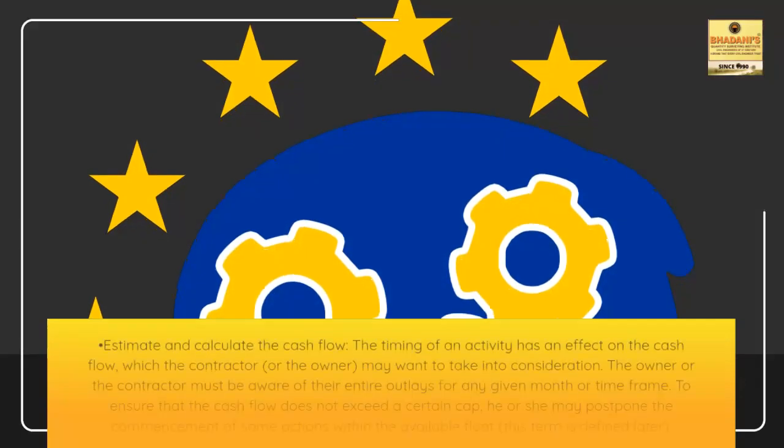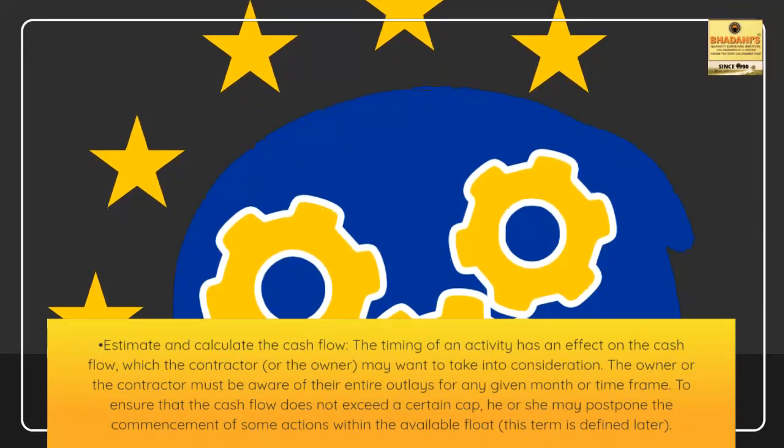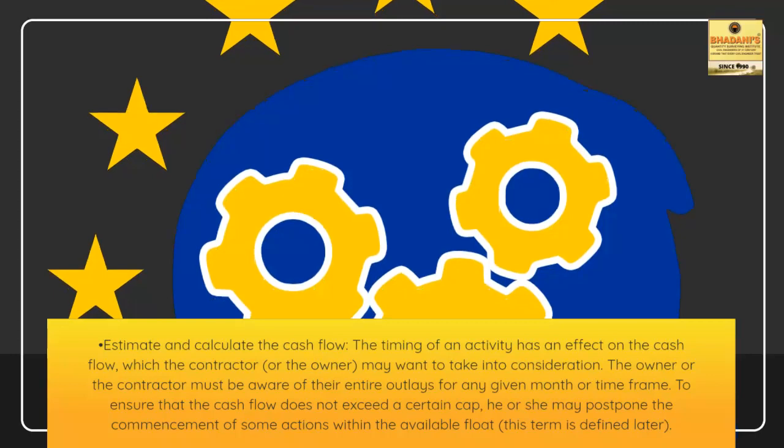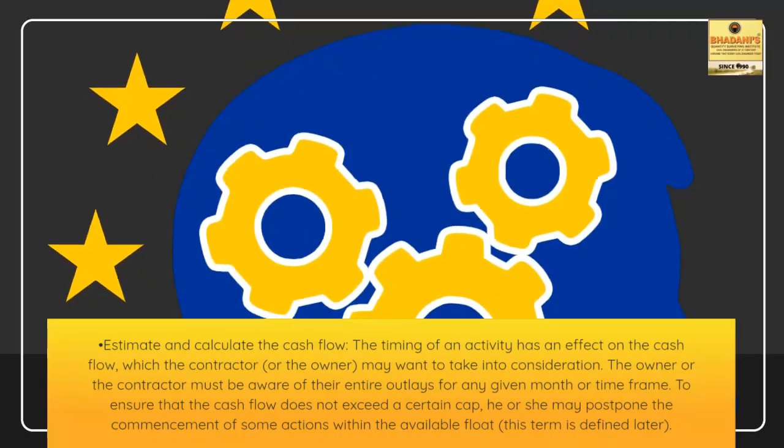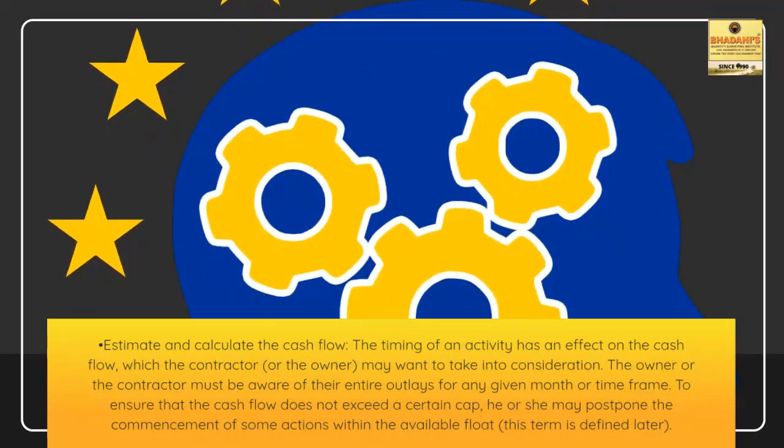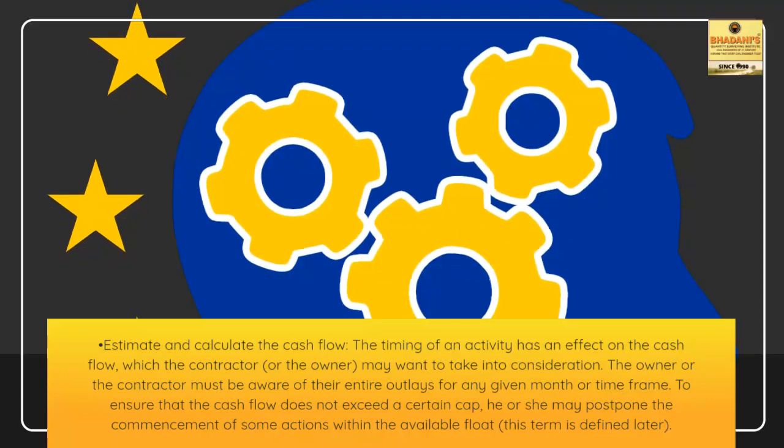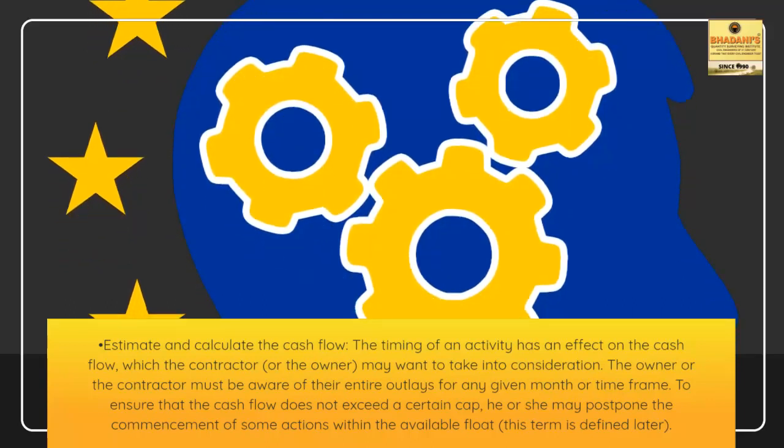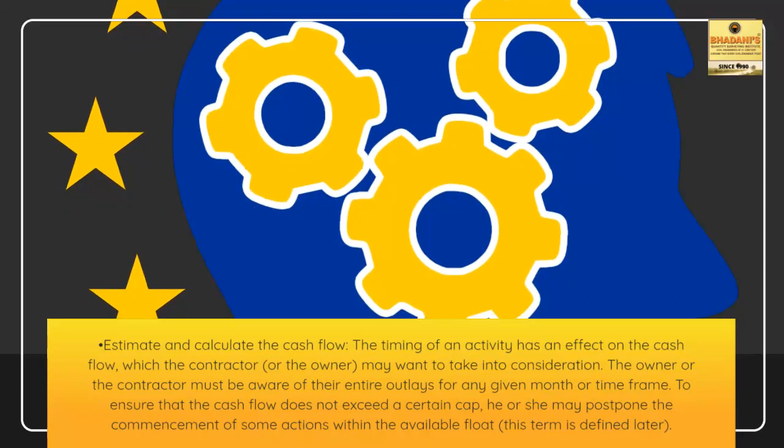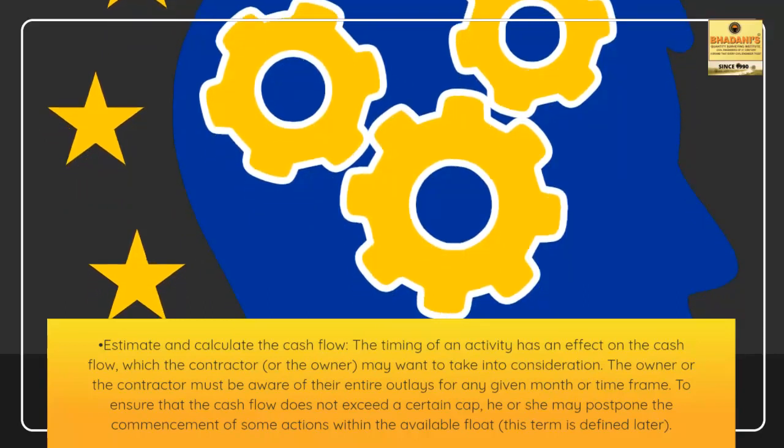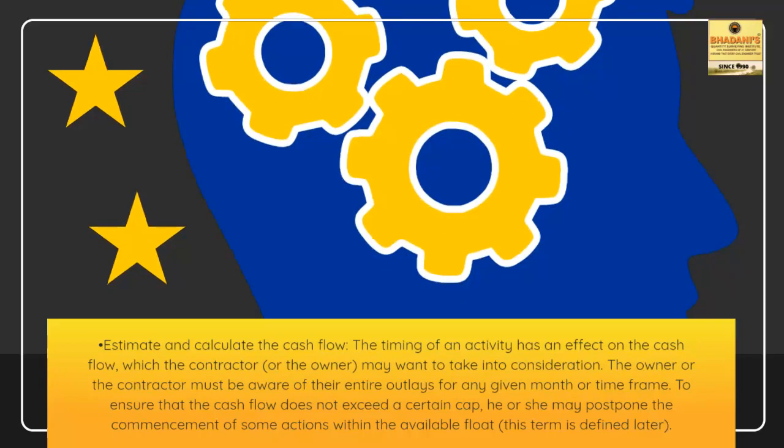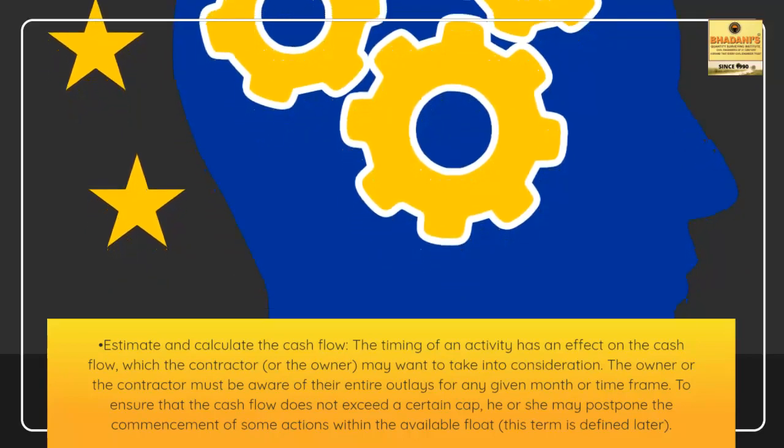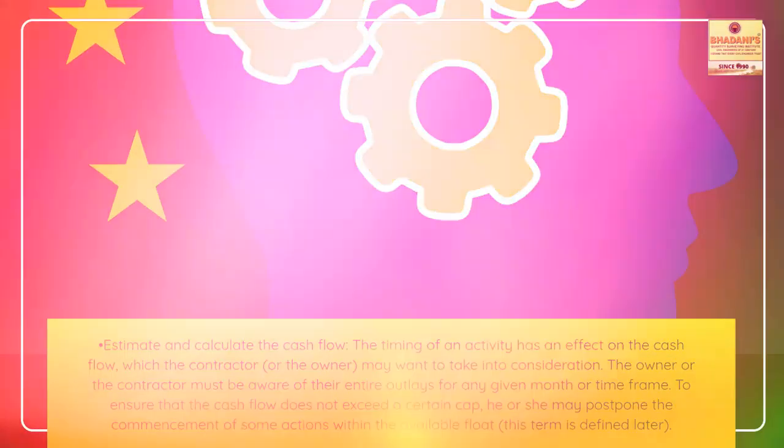Estimate and calculate the cash flow. The timing of an activity has an effect on the cash flow, which the contractor, or the owner, may want to take into consideration. The owner or the contractor must be aware of their entire outlays for any given month or time frame. To ensure that the cash flow does not exceed a certain cap, he or she may postpone the commencement of some actions within the available float. This term is defined later.